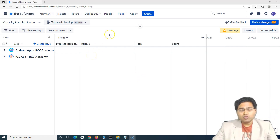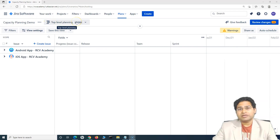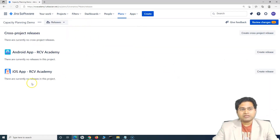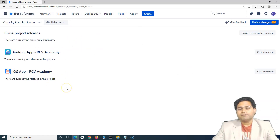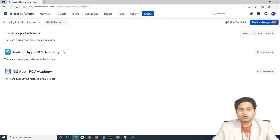The first thing is how you can create releases from the Jira roadmap. To enable or create releases directly from the roadmap, you simply have to go to the planning dropdown here, and below teams you will see releases as well. As soon as you select releases, it will display all plans you have created as part of this Jira roadmap plan, and for those projects you can create the release.